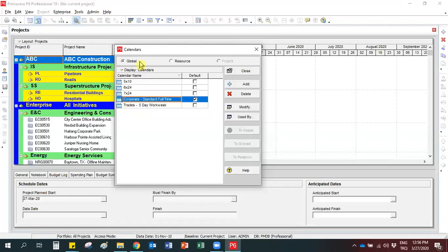And then the company starts another project in Russia. There may be some small differences, but let's assume that they have the same working days with your project. So if you create your calendar as a global calendar in P6, the new project can directly use your previous calendar. Otherwise, they have to spend some time to create their own calendar. This is especially important if the company is using a shared database. Therefore, the global calendar allows user to share the calendars between the projects.